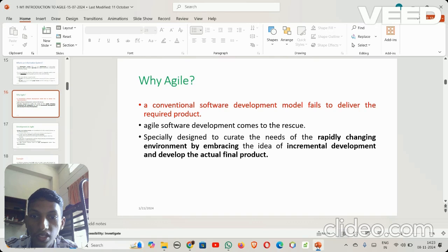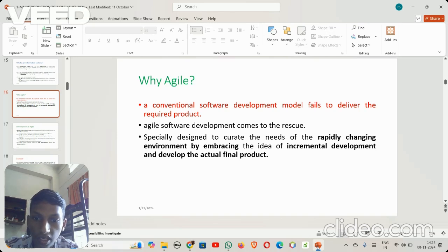The team then holds a sprint review meeting where they demo completed features to the product owner and the stakeholders. They also discuss what went well during the sprint and how they could improve the next one. Finally, the team holds a retrospective meeting where they reflect on what went well and what didn't go so well during the sprint. They can create a plan of action for addressing these issues in future sprints. This feedback loop helps to ensure that each sprint is more successful than the last.